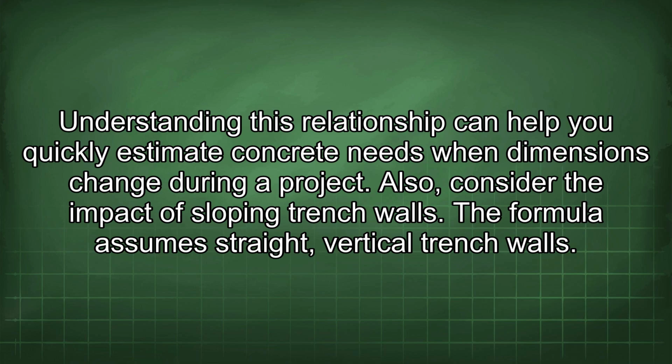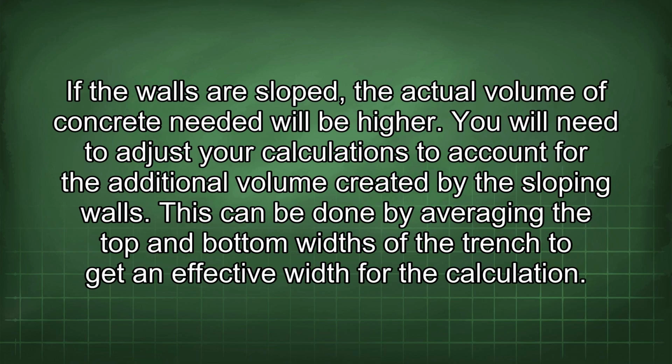Also, consider the impact of sloping trench walls. The formula assumes straight, vertical trench walls. If the walls are sloped, the actual volume of concrete needed will be higher. You will need to adjust your calculations to account for the additional volume created by the sloping walls. This can be done by averaging the top and bottom widths of the trench to get an effective width for the calculation.